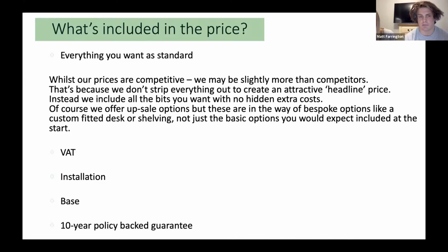For the 100%, that's for a couple of our clients where we build our office pods completely at the workshop, and then they're transported to site on a back of a flatbed lorry, and then craned using our unique cradle into site locations that can be delivered within 20 meters of the lorry.